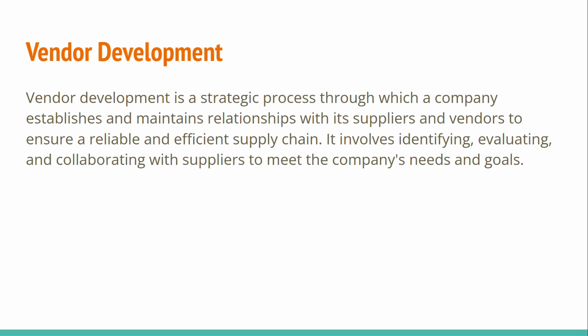Vendor development involves selecting and qualifying suppliers for components or services. For vendor development, some processes are there: vendor identification, capability audit, sample approval, rate finalization, long-term partnership. Long-term partnership is needed. Example: a supplier providing injection molded parts for an appliance company.